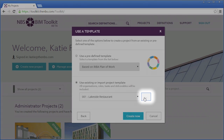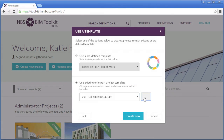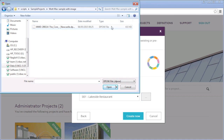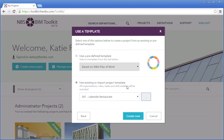The last option is to browse to a template file exported from the BIM Toolkit. You can export projects you have set up. One of the files exported is a project template file which has a file extension of .dpow. It will import the tasks, roles, deliverables and organisations from that project. Another user can use the .dpow file to import this into their BIM Toolkit. This is helpful if there is a change in Project Administrator, so you can import a .dpow file someone else has exported and pick up where they left off. This may also be helpful if you work within a larger organisation and are trying to push consistency through your supply chain on every project.